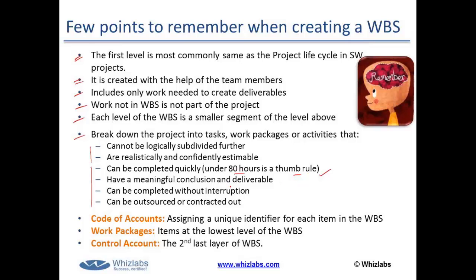They have a meaningful conclusion and deliverable, can be completed without interruption, and can be outsourced or contracted out. Also keep in mind that the last layer of the WBS is called the work package, or work packages, that you would see at the last layer of the WBS.